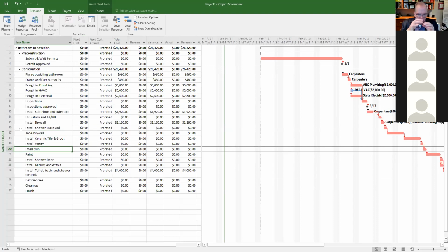I'm not going to list it out in minutia detail, because if you remember in the lecture, you kind of want quantities. And then if there's variation in a larger quantity, you can sort of dig deeper later on. But as a management of the project level, I just want to have a good sense of when I'm over or under on something that I budgeted for. You can get too detailed. That's why you don't want to have 10,000 different cost codes either.